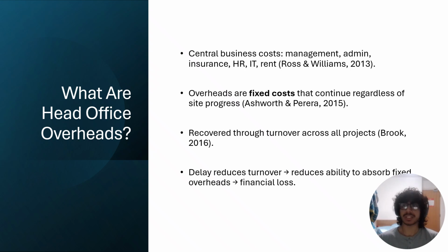Ashworth and Pereira point out that these costs continue regardless of what happens on site, which means they must be recovered through turnover from all active projects. Brooke adds that when delays occur, the contractor loses the opportunity to earn overhead contributions elsewhere. This reduction in turnover is the central justification for HOOH claims.